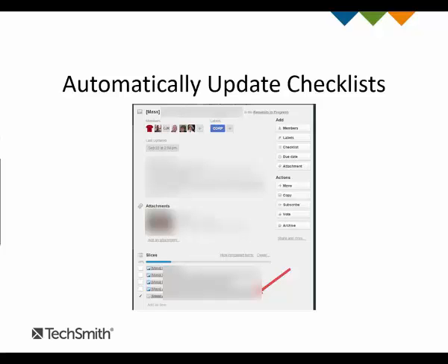So next we wanted to automatically update checklists. This would help facilitate moving cards between columns. When a child is published on the QA board, so your slice, in this case the one that the arrow is pointing to, that card has been published. The script runs through the QA board and it's like, oh, this slice is done, sweet, and checks it off on here.